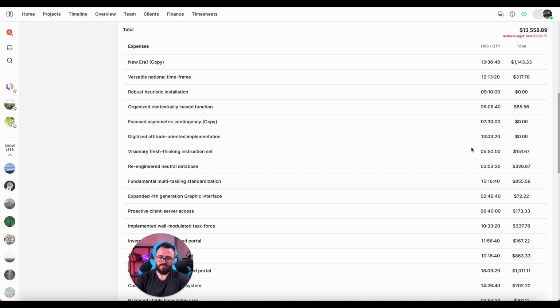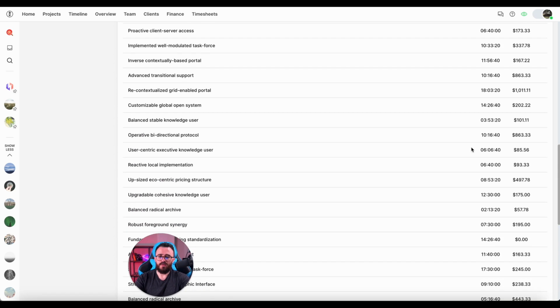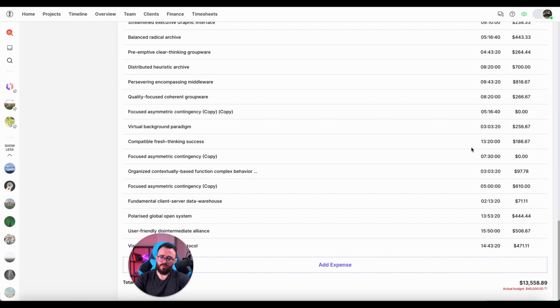The completed tasks will have 100% estimation put as tracked. So if it's estimated 4 hours, you worked only 2 hours, but it's fixed price contract. If the task is completed, it's going to show for 4 hours and you're going to charge for 4 hours. If you want to go actual time, charge for the actual time, you need to go to time and material